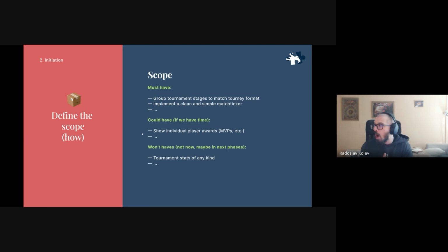Moving on. So what do we actually do? How do we actually achieve those? What are our milestones? Well, on Liquipedia, we do something called the MoSCoW method, which is you divide things by must-haves, could-haves, and won't-haves. So must-haves are the things that are non-negotiable and you should always include. So here we put, okay, we need to group the tournament stages to match the tournament format with the correct names and the correct split, just like web does it, because that's how people follow tournaments.